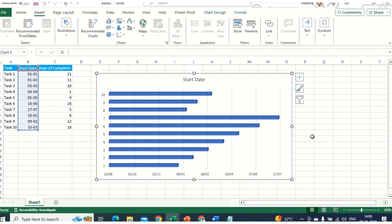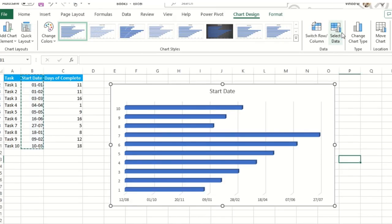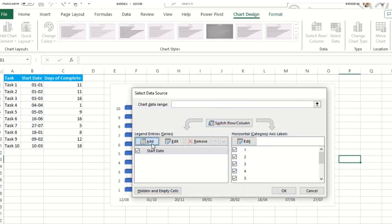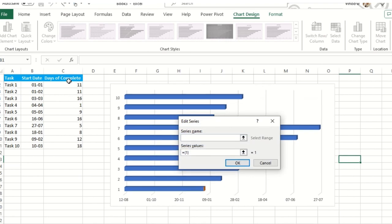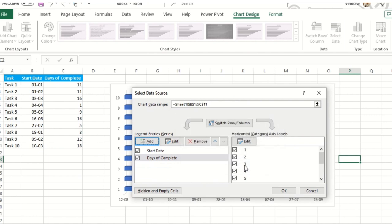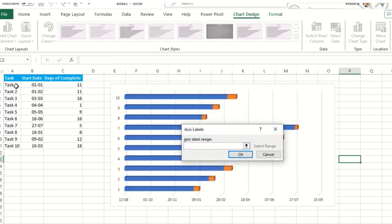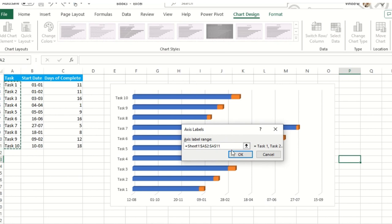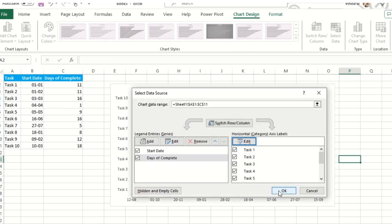The second step: select the chart again, click Chart Design, then Select Data once again. Click Add once more, add 'Days to Complete' as the series values. Then click Edit on the horizontal axis labels, select the entire task list — the task names will automatically get added as axis labels. Hit OK, then OK again.